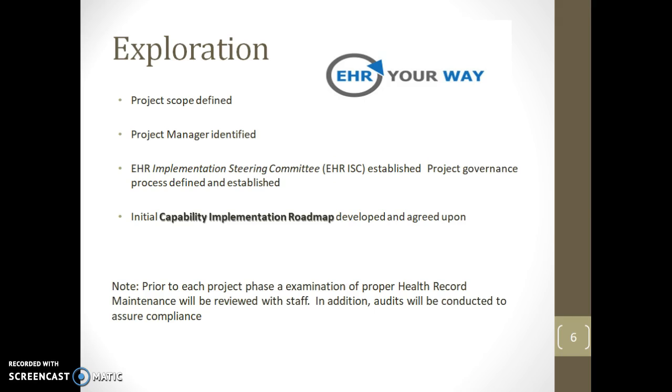The exploration phase sets the direction for the entire project. Key deliverables for this phase include project scope, EHR ISC, and project governance processes established, and ultimately the delivery of the EHR capability implementation roadmap. EHR Implementation Steering Committee is a group of leaders representing information technology, business, and functional leaders with the same mission of ensuring the effective and efficient delivery and sustainment of an enterprise EHR system. Stakeholders are project managers and EHR implementation steering committees.